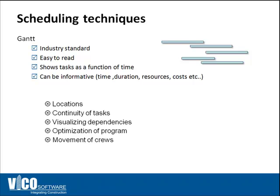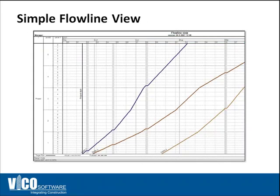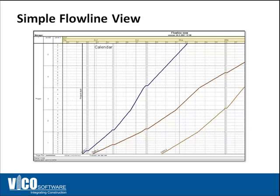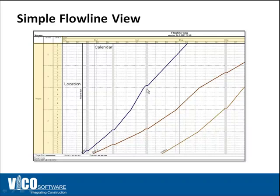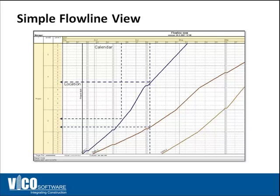Using flowline however, you'll be able to see all that in just one single view. On the top it shows a calendar and on the left side it shows a location. So in this case you have one, two, three, four, five floors and then you can see how crews pass through these locations represented by a simple line. It's easy to see where certain crews are at what point in time, it's easy to see how far they are apart in terms of locations, and you can also see time and location lag between locations and two crews very easily.